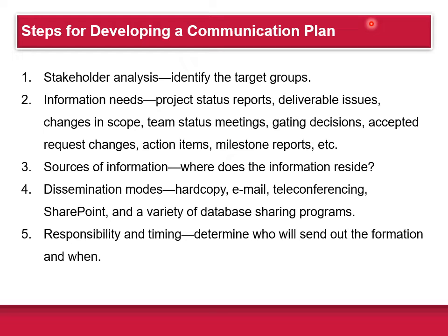The next one is the sources of information. Where do we get the information? We have to consider the dissemination modes. How are we going to get the information to the people that need it? Is it going to be hard copy, email? Are we going to have teleconferencing? How are we going to do it? And finally, the responsibility and timing. Who's going to send out that information and when?